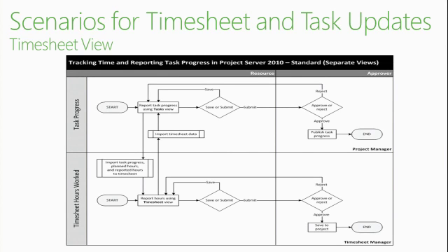So if you decide to enter the timesheet first, that is the bottom part of the screen there with the workflow. So you will start with your timesheet, you will enter your hours for the day, and then you will save and submit your timesheet update to your timesheet approver, who may be different from the project manager, who is really the one in charge of the project.